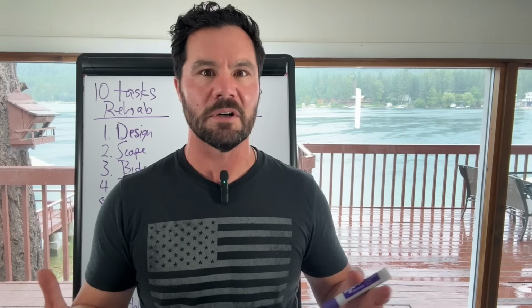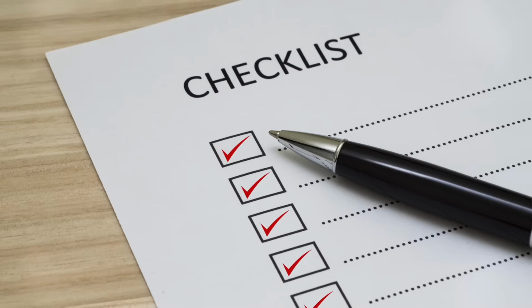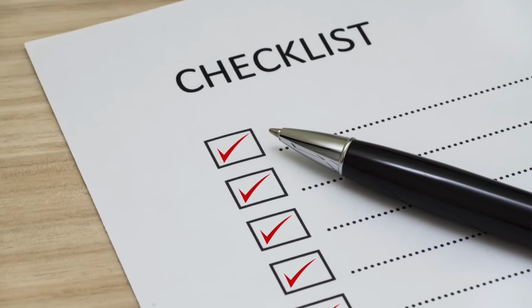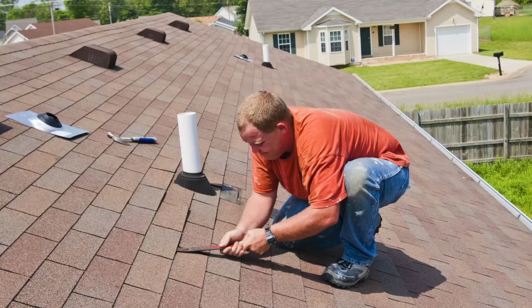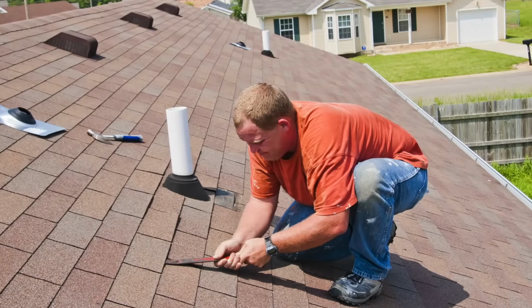What I do is I bring in a third-party punch list specialist, and I give him this big laundry list of things, tiny little things like the door's rubbing and needs adjusted, there's a screw loose on the railing, whatever. Very detailed stuff a really good punch list contractor specializes in. And I usually budget $1,000, $1,500 on every project just for the punch list. That punch list can turn into $5,000 if you don't manage all your subs correctly and make sure that they're getting as close to 100% of their scope done as possible.